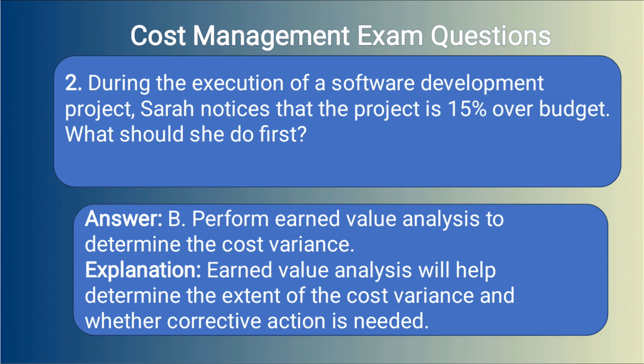Answer. B. Perform earned value analysis to determine the cost variance. Explanation. Earned value analysis will help determine the extent of the cost variance and whether corrective action is needed.